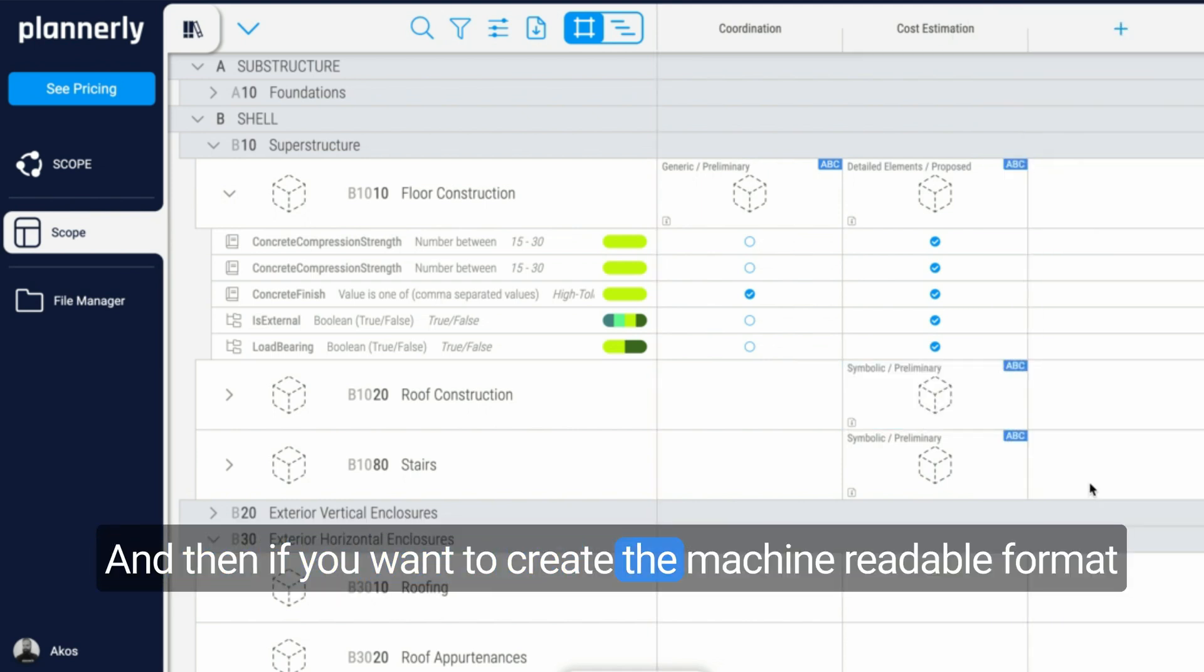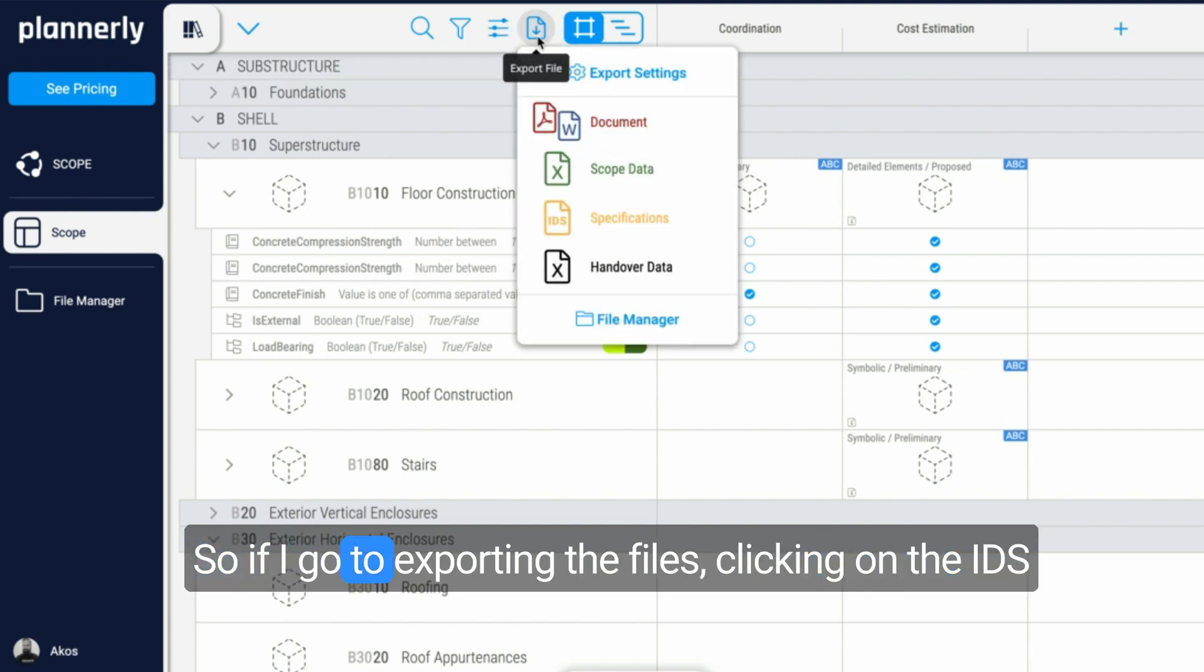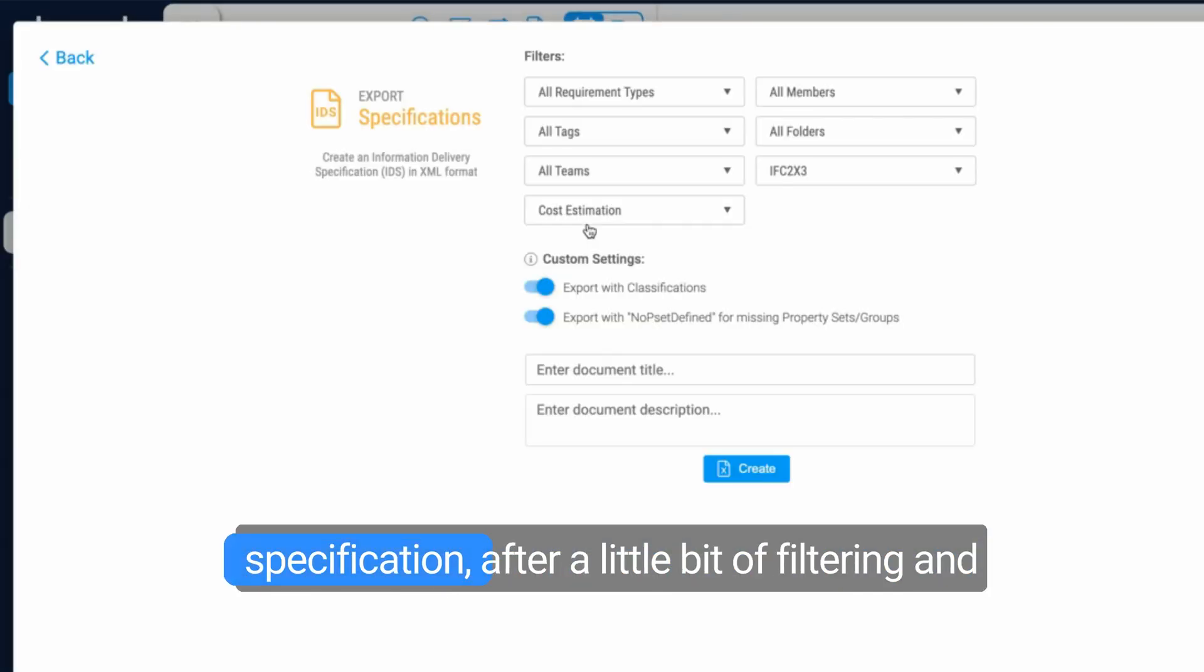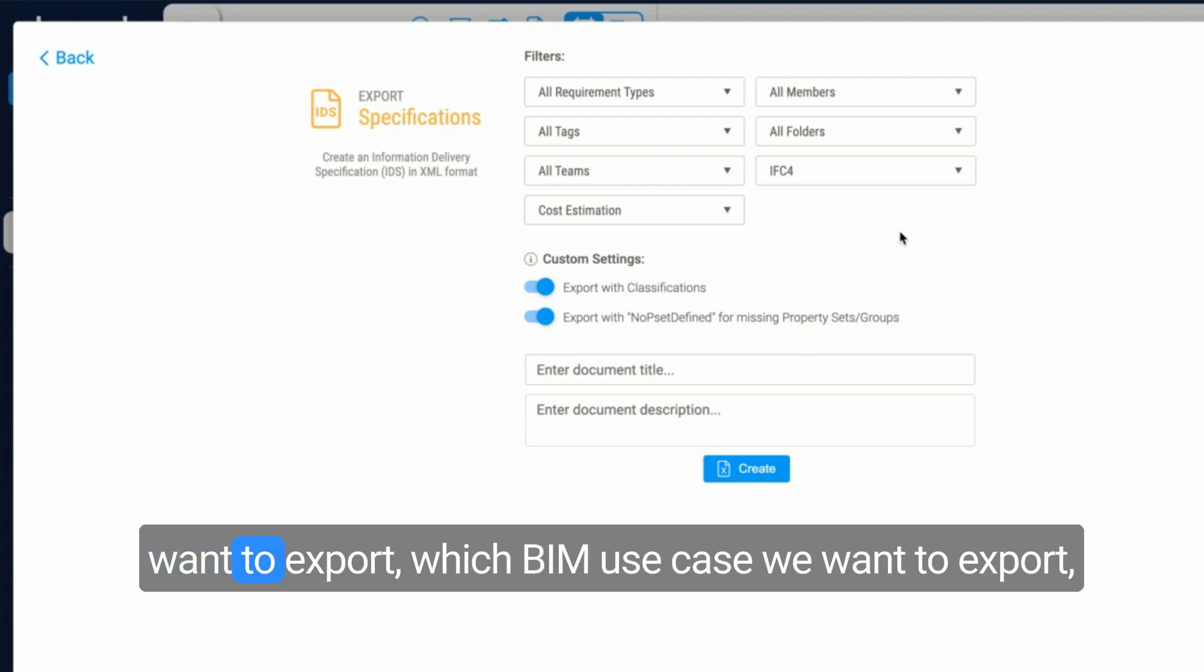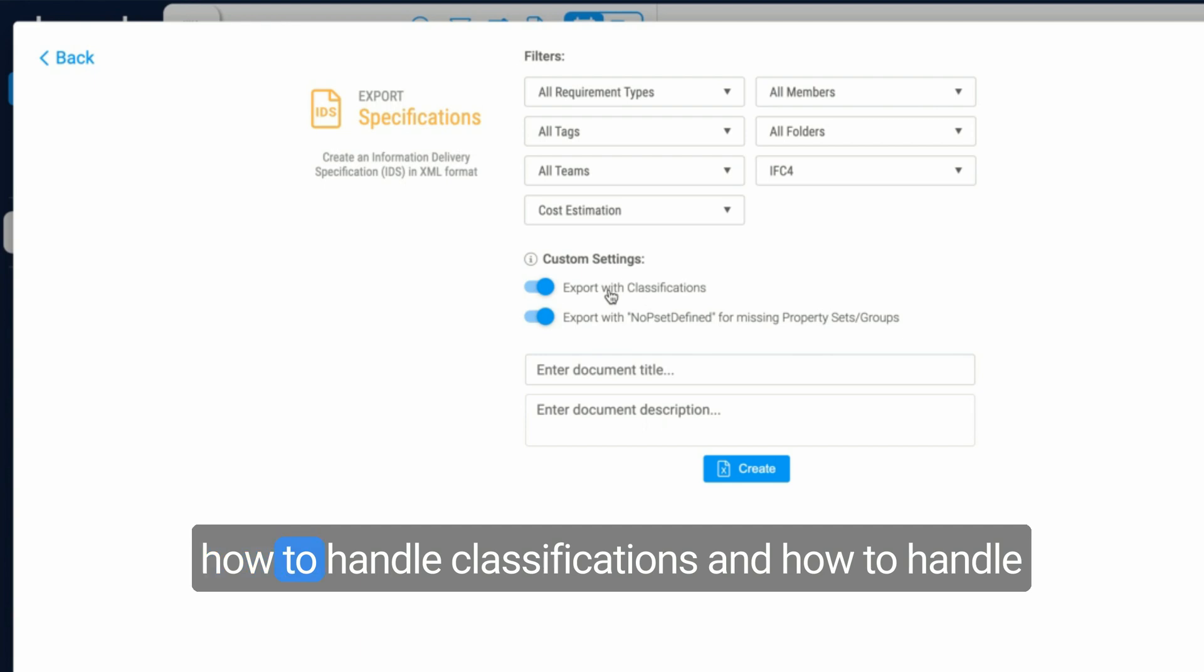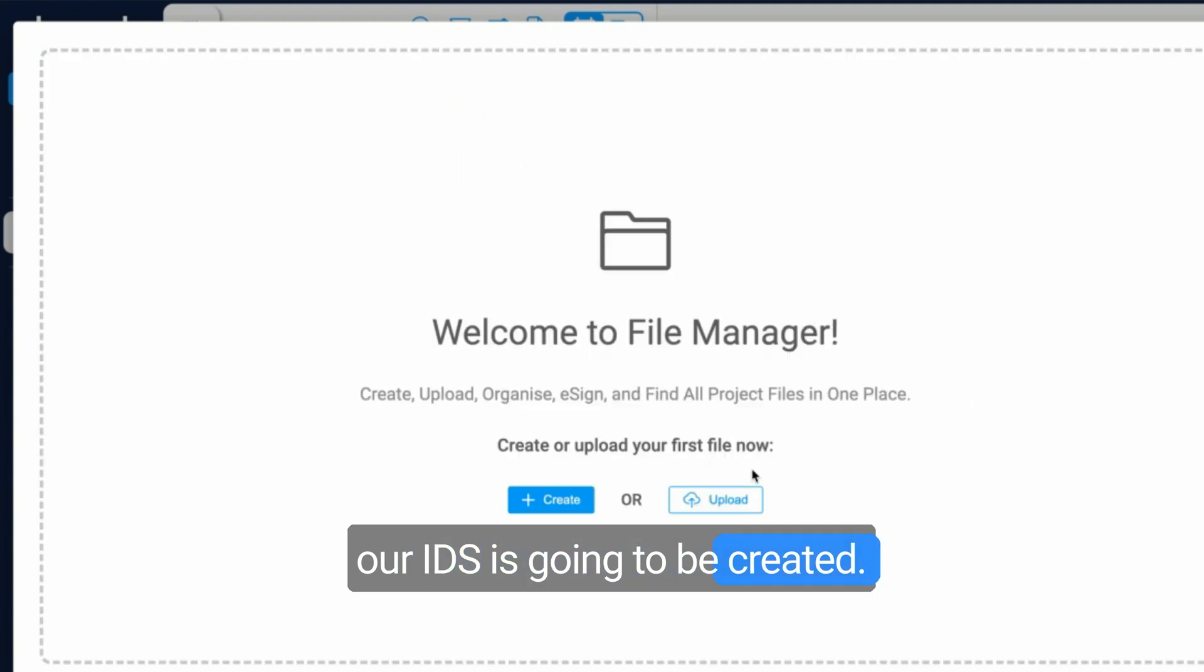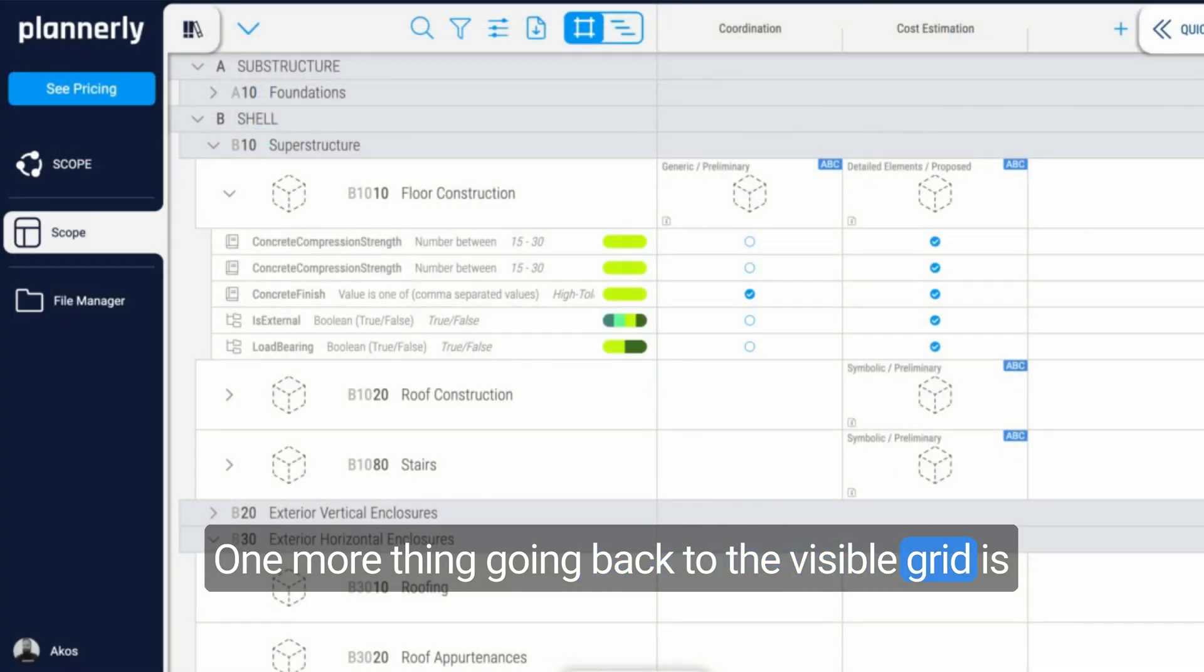If we want to create the machine-readable format of the IDS, it's just a click from here. So if I go to exporting the files, clicking on the IDS specification, after a little bit of filtering and choosing which version of the IFC we want to export, which BIM use case we want to export, whether it's the coordination or cost estimation, and how to handle classifications and how to handle groups, our IDS is going to be created.